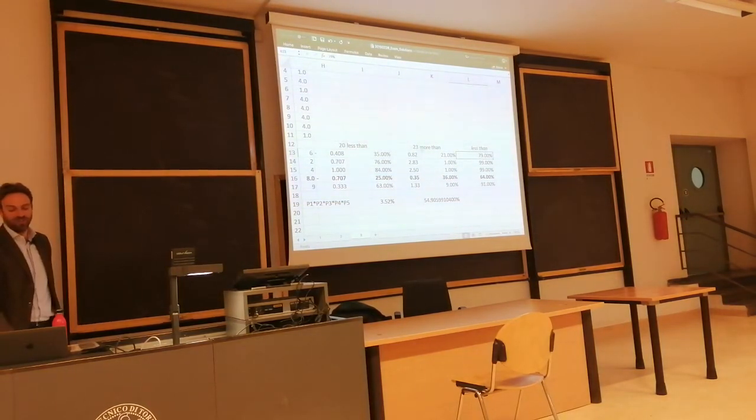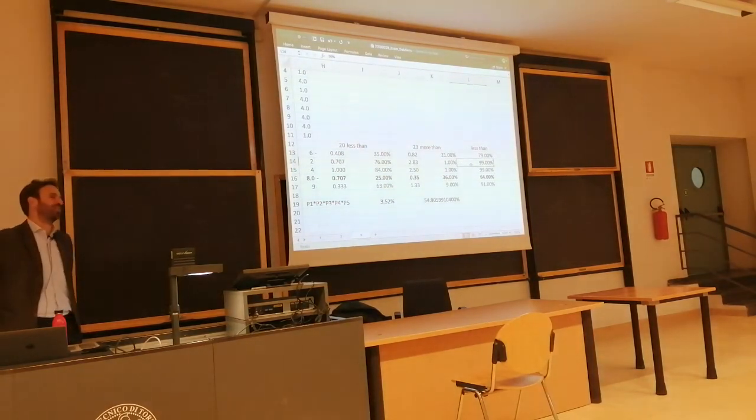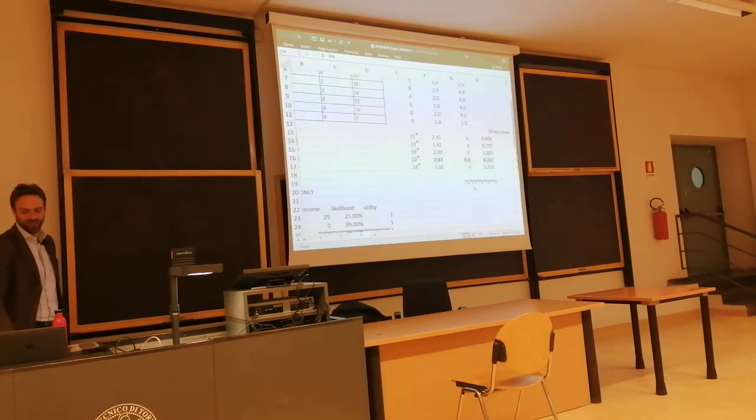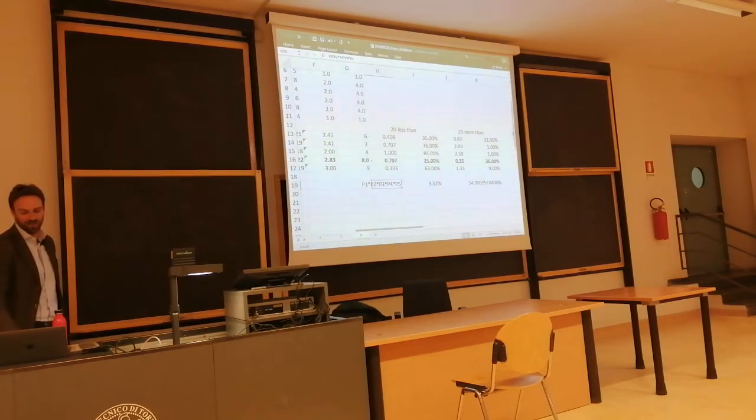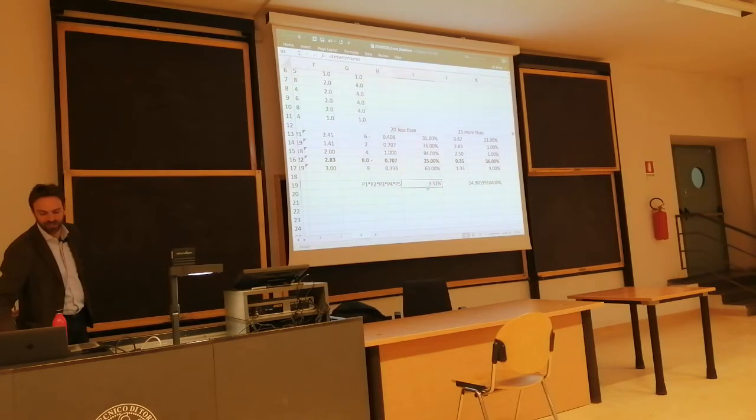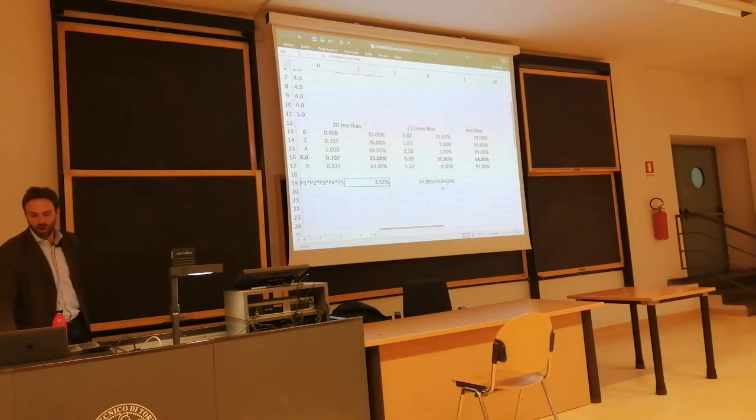I realized that the chances to finish before 23 for path number 2 and path number 3 equals 99.6 sigma. So in fact what we need to consider is that the chances to finish the project in less than 20 days is the multiplication of all those probabilities here, which raises down to 3.52% chances to finish before 20. While we do incur into 55% chances to finish before 23.